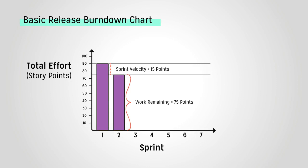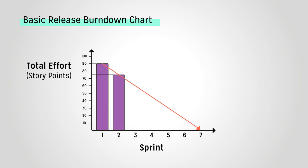Let's say our total effort was 90 story points, and we completed 15 story points in the first sprint. From the release burndown, we can see that our velocity for the sprint was 15 points, and the work remaining is 75 points. We're starting Sprint 2 with 75 story points remaining. If we wanted to predict how many sprints this product will take to complete, we can draw a prediction line through the bars. Based on it, the project should take 6 sprints — not 7, because at the beginning of sprint 7 there would be no story points remaining, meaning you wouldn't need that sprint.